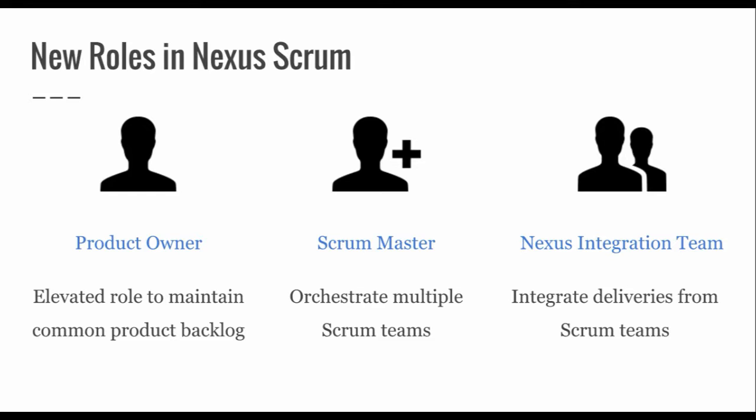And finally, the integration team members. These are special developers and testers who are responsible to facilitate the integration of deliveries from multiple teams. As time permits, they may also be part of a single Scrum development team. Together, these three roles constitute a Nexus integration team.